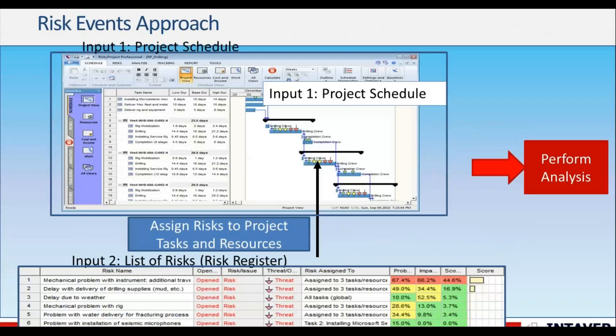RiskyProject simplifies this process with the risk events approach. It has two major components: a risk register and a scheduling engine. The schedule includes schedule costs and resources. Risks are defined by probability and impact on cost and schedule. Risks are then assigned to the project activities and resources. This process allows you to quickly identify cost and schedule uncertainty at both the project and activity level, and prioritize risks based on their impact on cost or schedule.